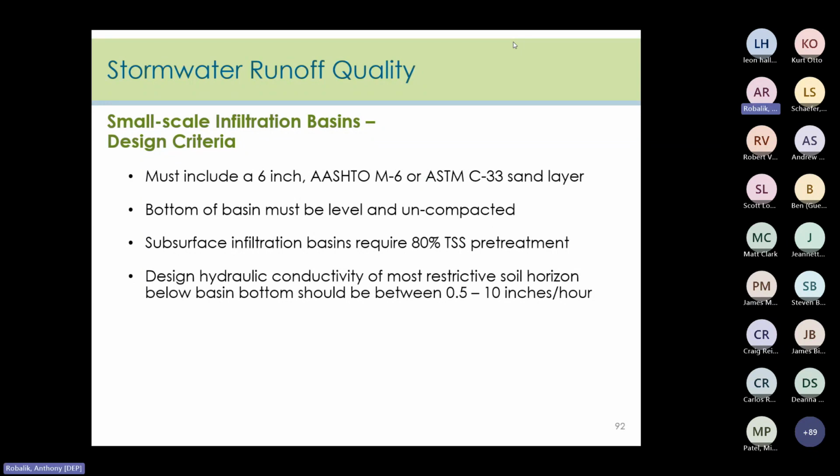During your review, you must check that the minimum thickness of the appropriate sand is present and check that the basin is not used as a stockpile location during construction. Look at the existing grading plan and figure out how heavy equipment is going to clear this portion of the site, and make sure that there's anti-compaction language on the plans as well as the as-built soil testing.